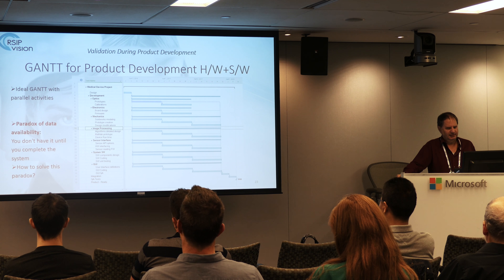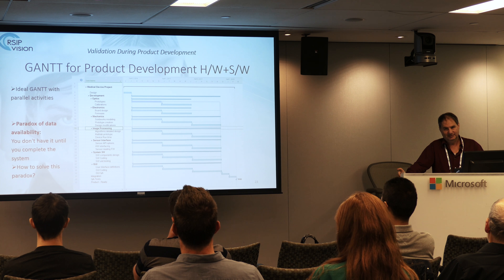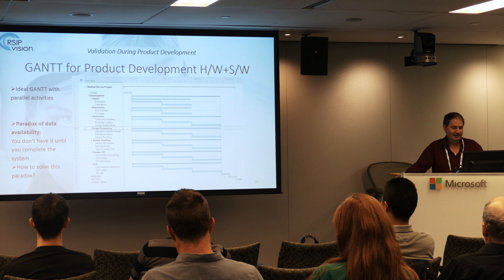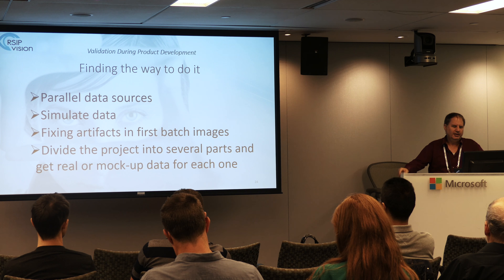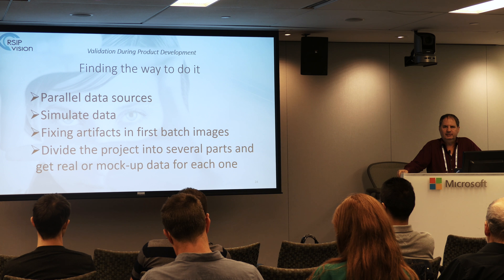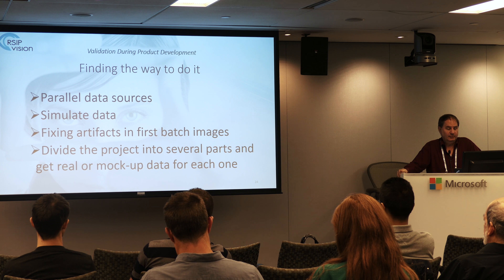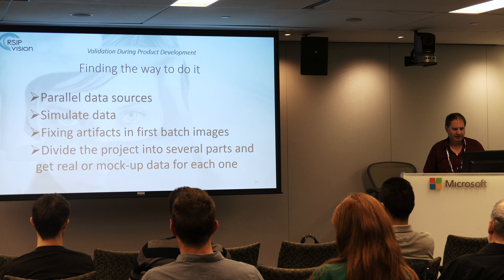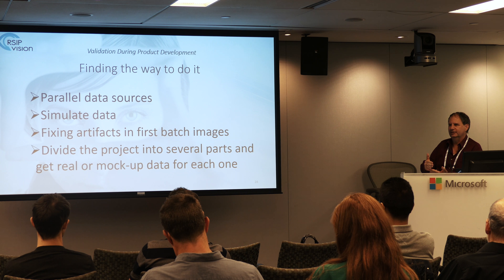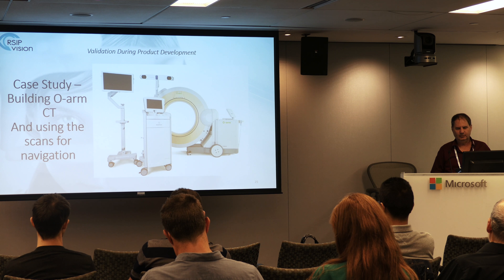We develop the optics, electronics, system software, and GUI all in parallel — but there's a catch. For the image processing team, we don't have any images at the beginning; all the real images will come at the end. So we have some options connected to how we create the roadmap: we can get parallel data sources, simulate data, fix artifacts from the first batch. The way to do it is to divide the project into different parts, and in each part have some way to develop and test it.